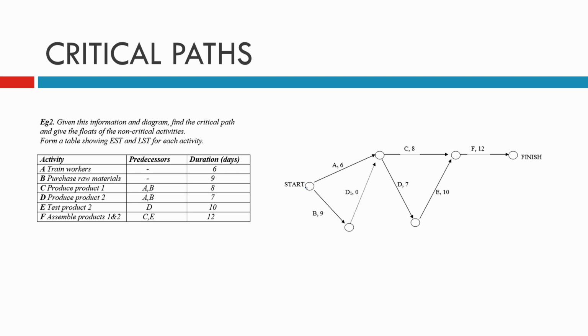This time we'll do it the other way, just a box, and then we'll do the triangle for coming back. So 0 in the box here, and 0 from the next branch on the B branch. Then to get to A, we've got 6. Oh, sorry, we better start that one again because we forgot to include this branch here. So to get to B is 9. 9 and the dummy is 9, or along the A was a 6. We better write the 9 in there. Remember, it's the highest number.